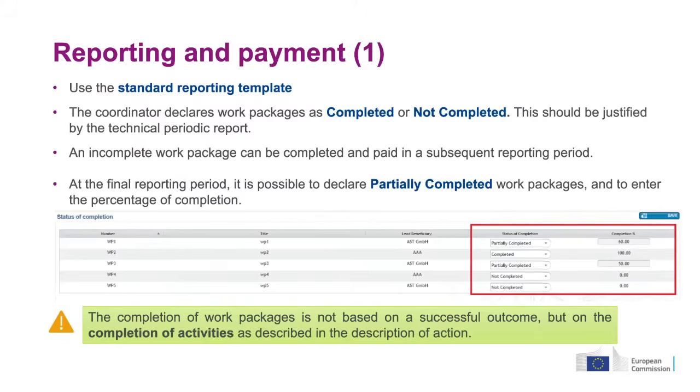And I think this is an important principle here at the bottom. It's not dependent on your work package having been successful in the sense of scientific success. It is only dependent on you having done the activities that were described. It is fully clear that we would be very happy, everybody, if your work was highly successful, but that is not a condition to be reimbursed.